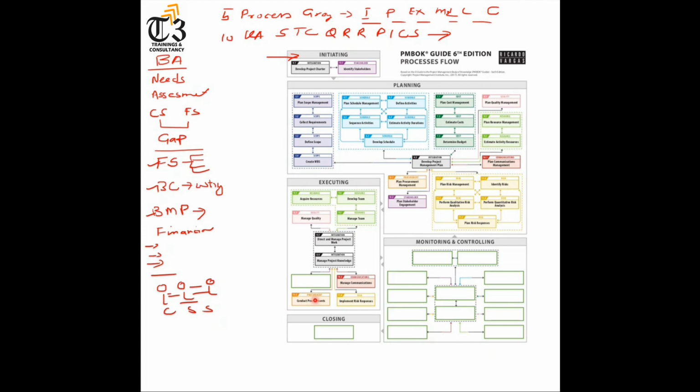Or cost reimbursable contracts, where the scope of work is not clearly available, and can be used for longer durations of project. And the primary condition is you need to have a strong financial audit to make those contracts. And time and material contract, where you have unit rates defined. In cost reimbursable, we have 3: cost plus fixed fee, which means fees and your execution charges, or cost plus incentive fees to motivate the supplier, or cost plus award fees. The legitimate cost will be paid, but your fees will be based upon your performance. So that's how we make the agreement, and then we manage the agreements.